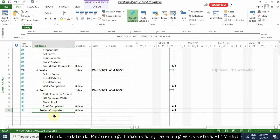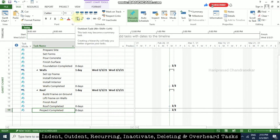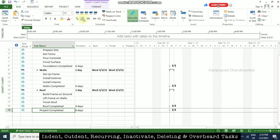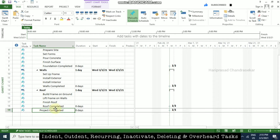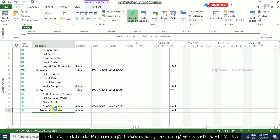Like this we can do outdent and also indent. The shortcut for indent is Alt+Shift+Right arrow. When you try Alt+Shift+Right arrow, you can see it keeps going further in. If you want to go left, you can use the left arrow instead.